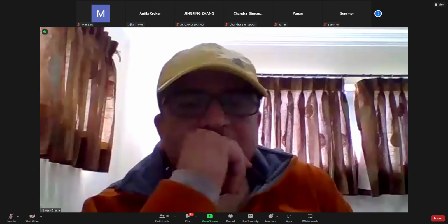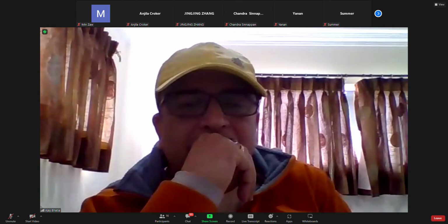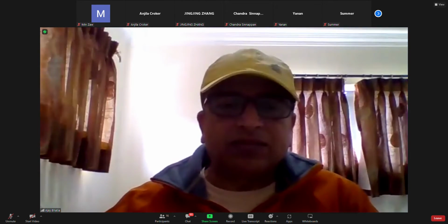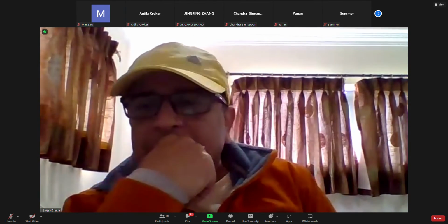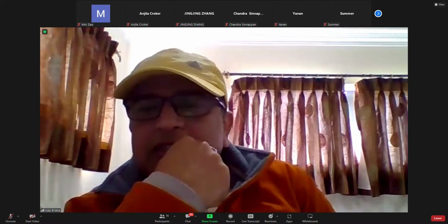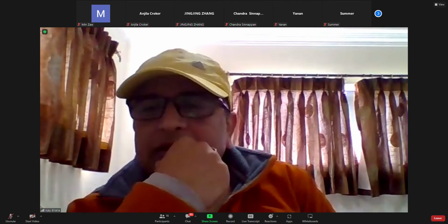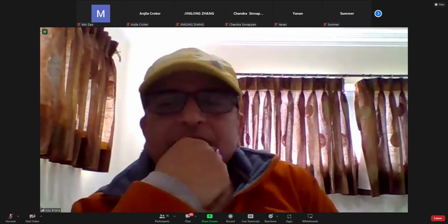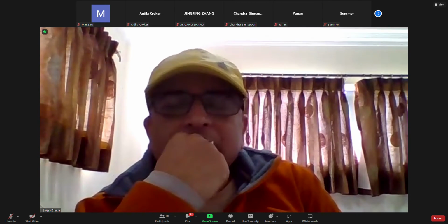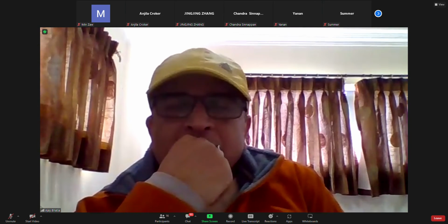For calculating the UB, is it just length times girth times weight factor, or should it be length times weight? It's just length times weight, because in UB you are already given the weight.